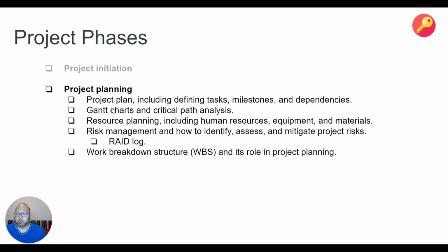Project planning, you're going to obviously spend some time with the team now, understanding the project. Now you're going to break that down into activities. All those activities will be broken down into a work breakdown structure. Put some milestones, when we think we can actually finish the development, when do you think we can start testing, etc. And then any dependencies.